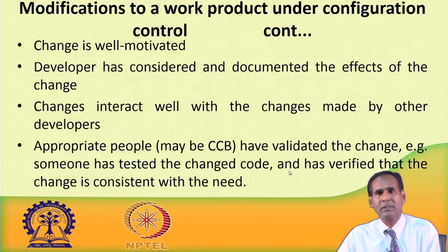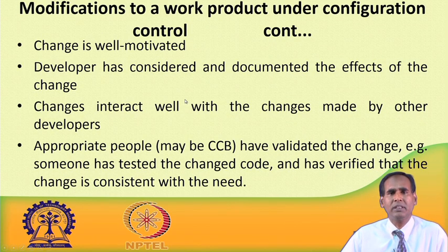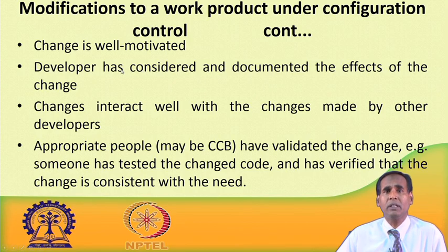They may give comments in these aspects, that the change is well motivated. The developer has considered and documented what the effects of the change will be. The developer has also already considered and documented whether there is an adverse effect or only positive effects. If there is any negative effect, the developer has already mentioned it. So, the committee is aware of that.